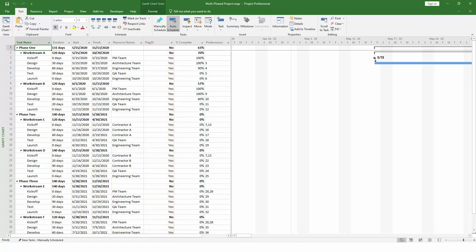You can make charts of various sizes and levels of detail in OnePager, from very high-level overviews to detailed reviews. In this case, we'll keep things at a fairly high level and select around 20 to 30 tasks and milestones. If you have a very large project schedule, you can still select a relatively small number of tasks and create a clear and concise OnePager chart.